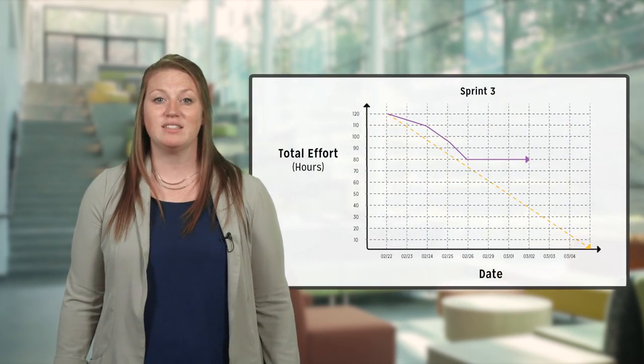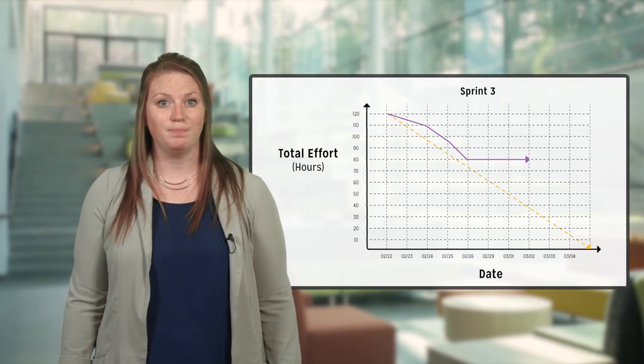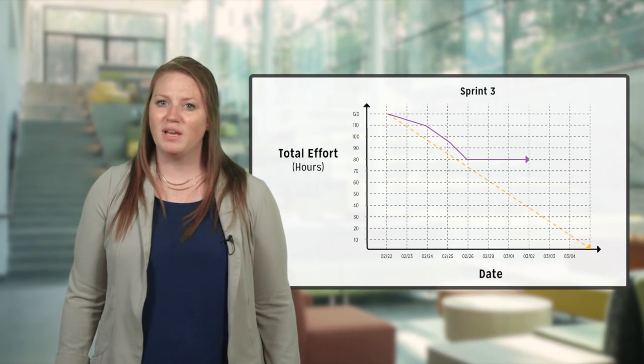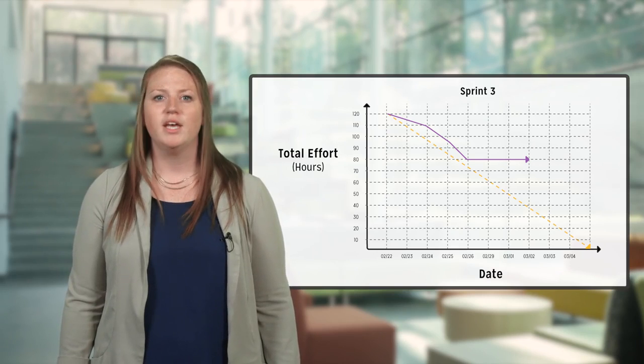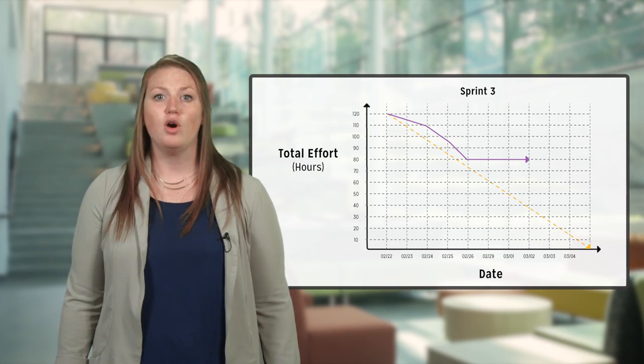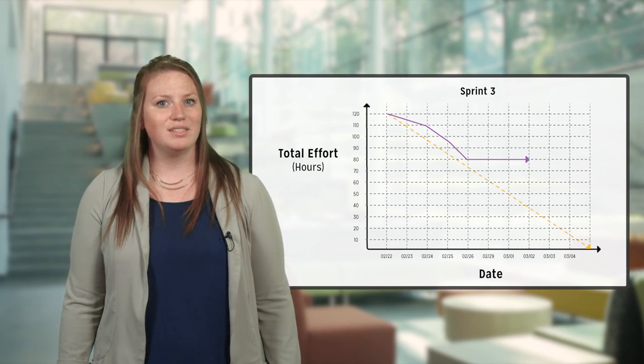When a burndown starts to burn across, it usually means that tasks are getting started but not completed. If this happens to you, your best solution is to have a discussion with the team to prioritize completing active tasks over starting new tasks. This could mean that when a team member has free time, they could help someone else finish rather than starting an independent new task. If burn across continues, you risk having user stories in half-done states at the end of the iteration.